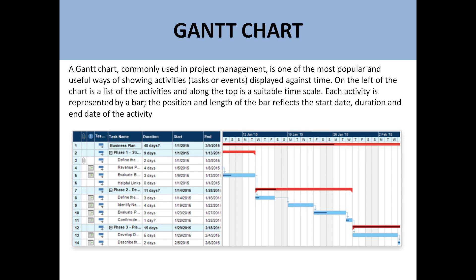The Gantt chart is used to show activities — activities mean tasks or events — displayed against time. On the left side of the chart is a list of the activities, and along the top is a suitable time scale. Each activity is represented by a bar. For example, if you see here on the left side, here is the name of the task.